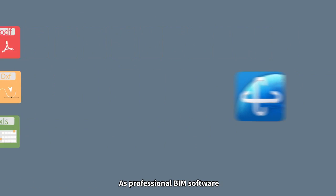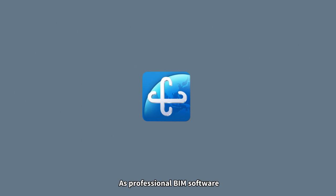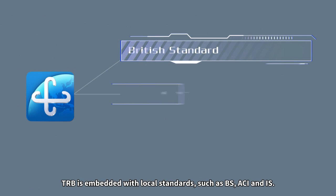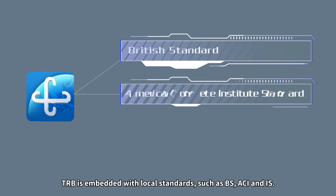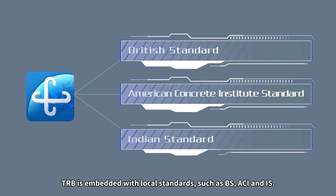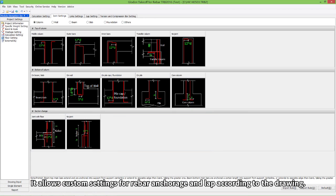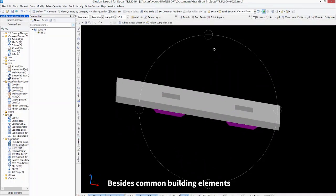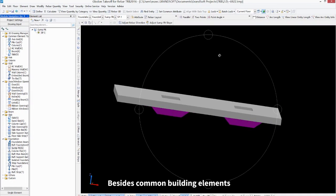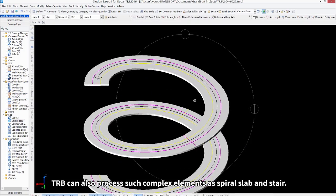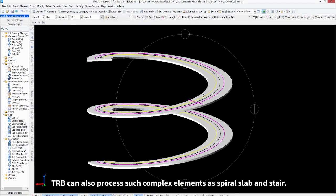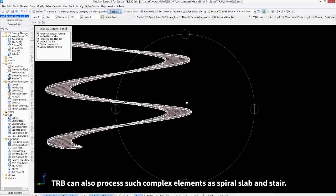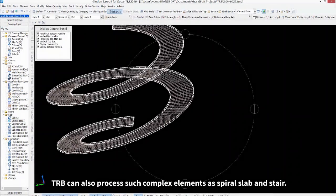As professional BIM software, TRB is embedded with local standards such as BS, ACI and IS. It allows custom settings for rebar, anchorage and lap according to the drawing. Besides common building elements, TRB can also process such complex elements as spiral slab and stair.